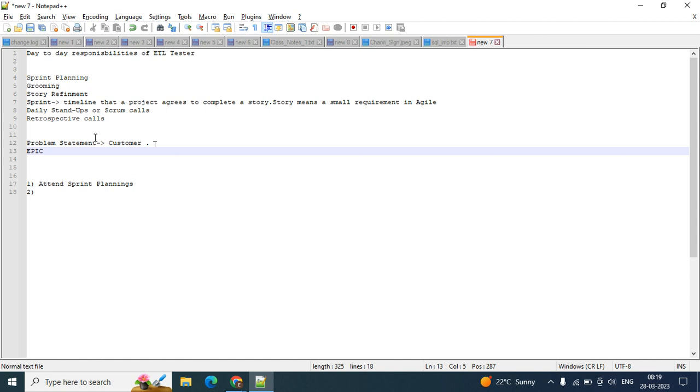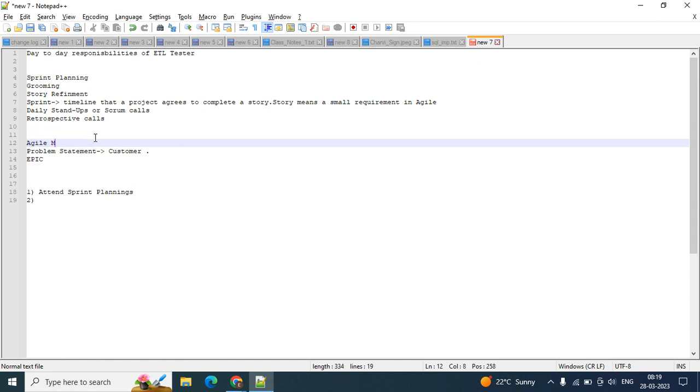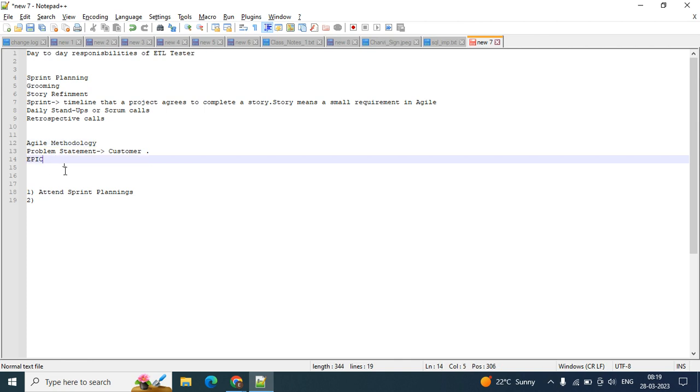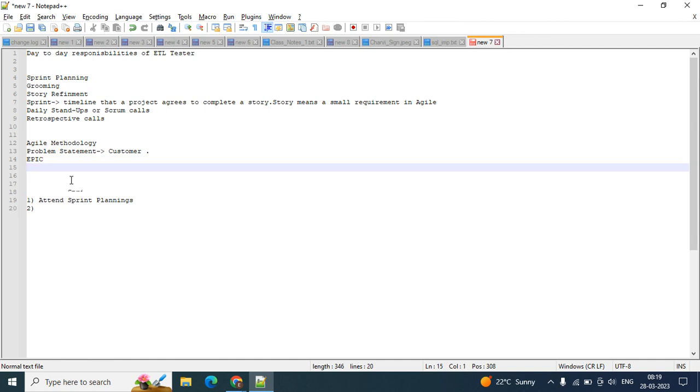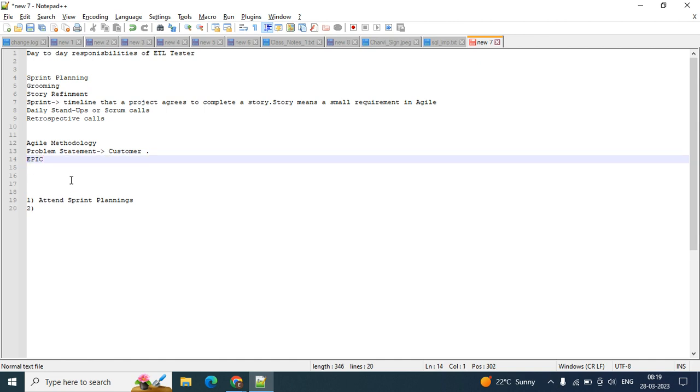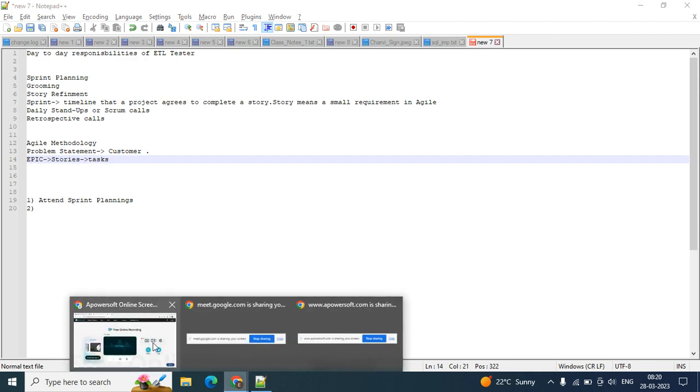So I'm explaining the Agile methodology for you. The high level requirement is called an epic, and this epic is broken down into stories, and these stories are broken into many tasks. Understood? So let me show you an example.